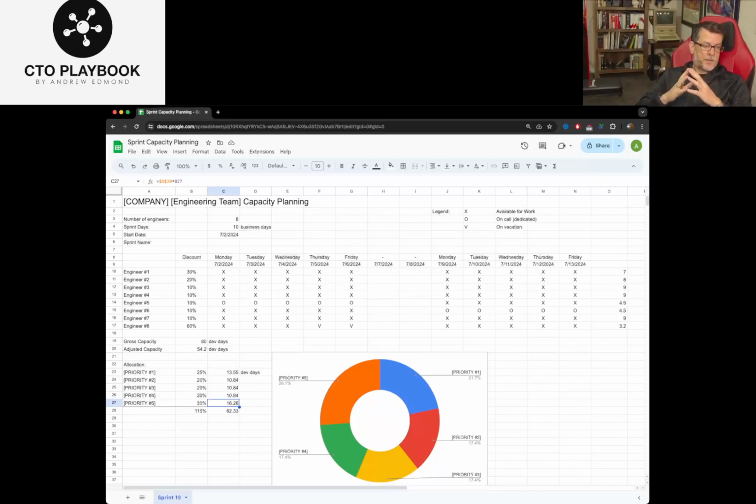Also, when I think about sprints, I don't think about the mandate or the need or kind of the goal being that we do 100% of every sprint as a commitment of what we do. If somehow miraculously every sprint, I say we completed every single thing that we intended to do, I might walk away with the feeling as a stakeholder that the engineering team is sandbagging it. And it's true. If you're finishing 100% of every sprint, you're not stretching yourself. You're not putting pressure on the team. Therefore, the real goal is to get somewhere between 85 and 95% of every sprint complete.